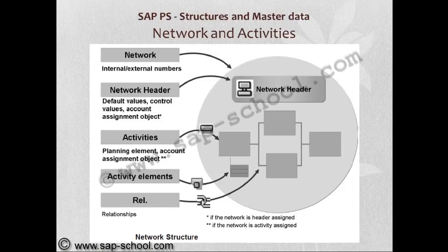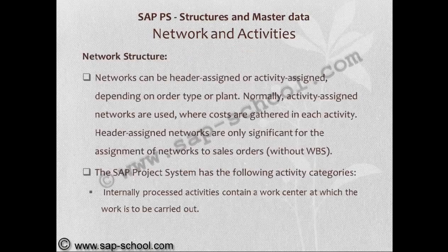This network header can be header assigned or activity assigned. Networks can be header assigned or activity assigned depending upon the order type or plan. Normally, activity assigned networks are used where costs are gathered in each activity. Header assigned networks are only significant for the assignment of networks to sales orders. That means no WBS will be used.